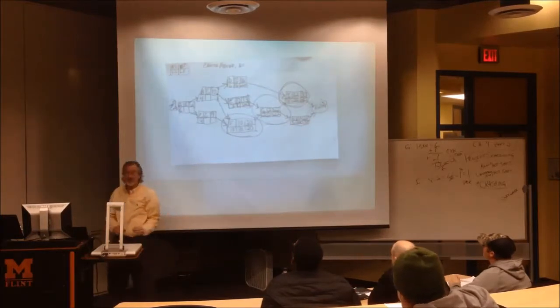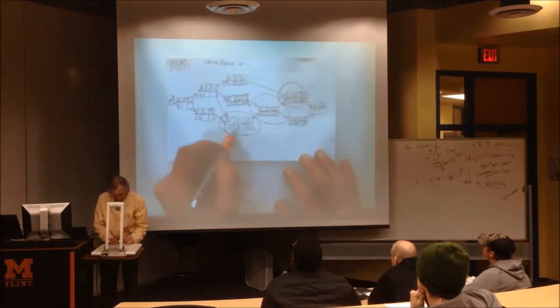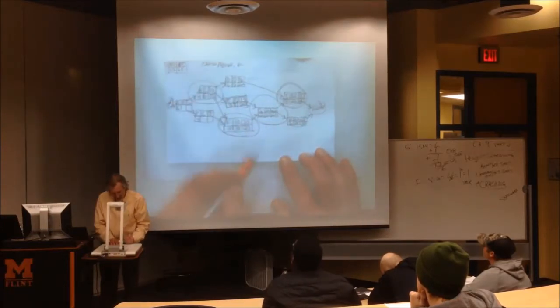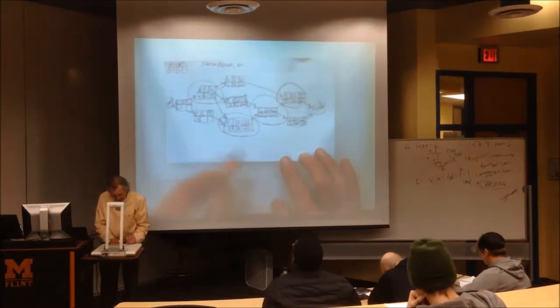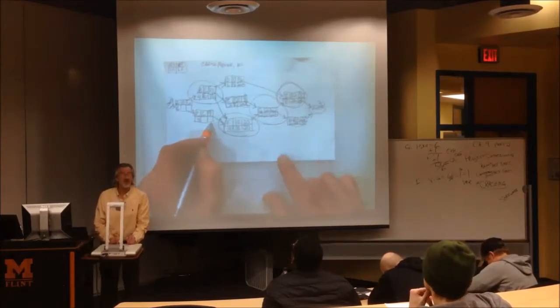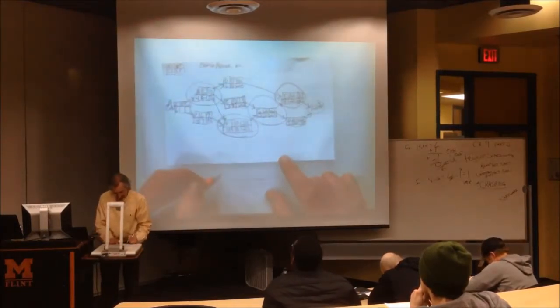You go with the least amount of time, which is this number right there, which we then put up here as a 10. Subtract 4 is a 6. Look at what we just found. Critical activity. C could start as late or finish as late as how much? 10. It only has one activity after it. Subtract 3 puts us at 7.